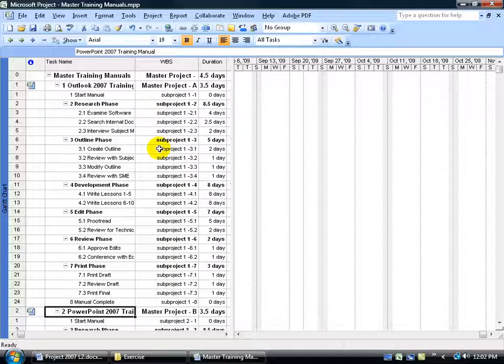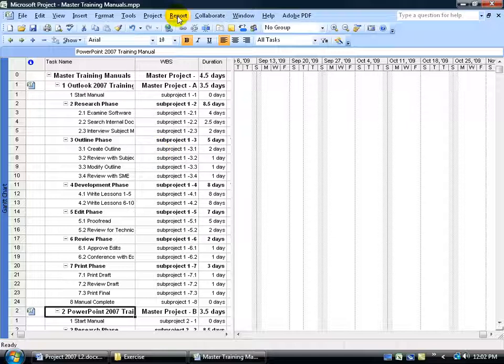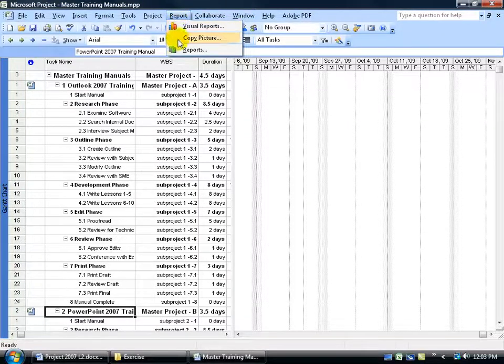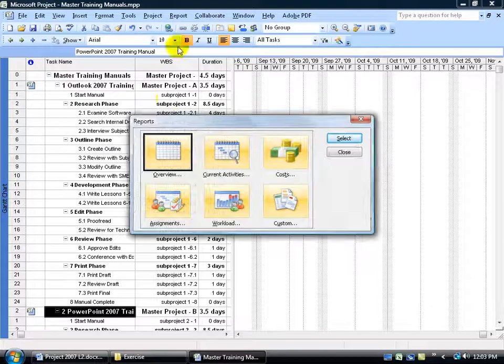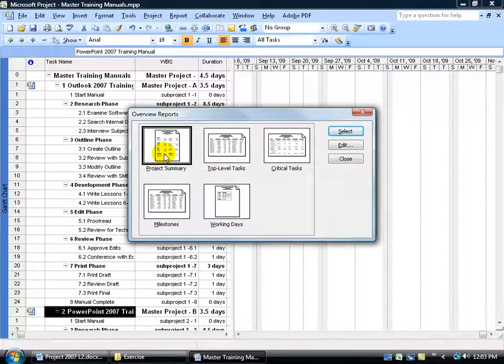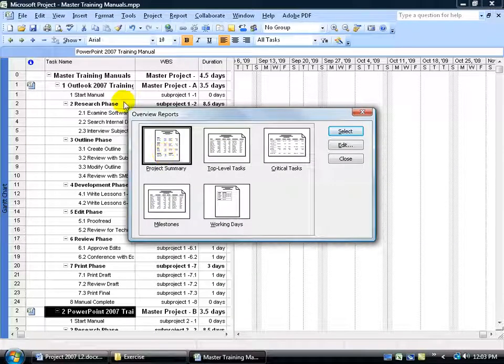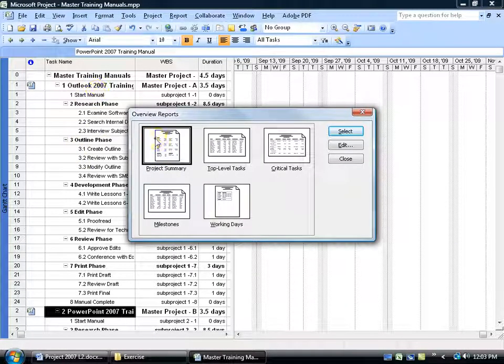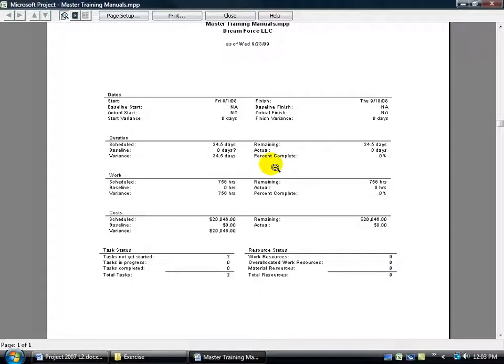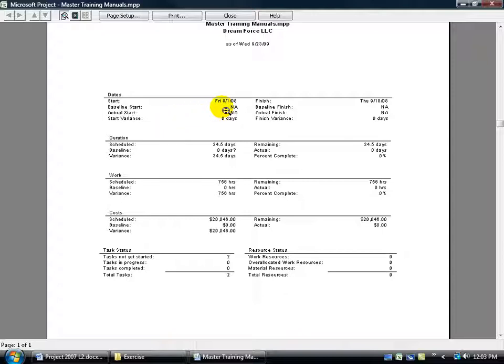Another thought that I have with my master project file is what about reports. Let's come up here and see what our reports look like for our master project. Click on the report menu, go down to reports. Let's do a quick overview. Double click on that. And we just want the basic project summary of our master. Double click on that. And let's click in to zoom in here. Now these are the totals for the master project. The start date is August 1st and it ends the 18th. As you recall, those 2 separate projects start at the same time. And here's the total cost between both projects and the total hours, a combination of both.